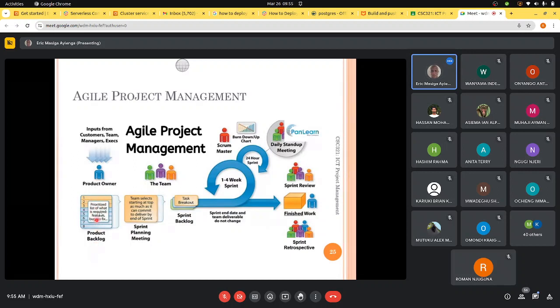Now we have prioritized our list. So having prioritized our list, we can say the first sprint is going to have from requirement 1 to requirement 6. So we are saying for these 4 weeks, we shall do from 1 to 6. Then the next 4 weeks, the next sprint shall do 7 to 10.